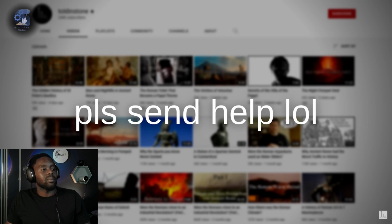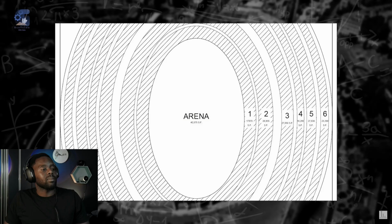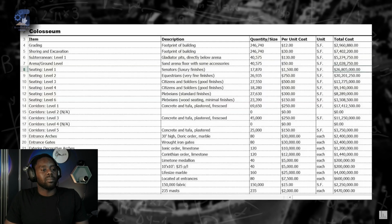To my profound relief, several subscribers heroically volunteered to undertake the task. The first of the 3 detailed estimates I received was submitted by a subscriber with the username Magnificus, an architectural project manager. With the use of computer-aided design and estimating software, he proceeded level by level, expensing by material and finishes. Thus, he assessed the cost of the senatorial podium, with its lavish use of marble, at nearly $27 million, but assigned the uppermost tier of seating, with its wooden benches, a cost of only $3.5 million.